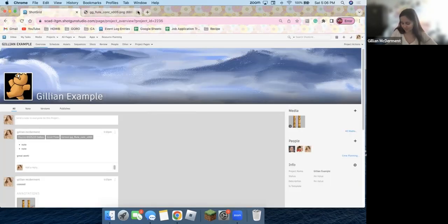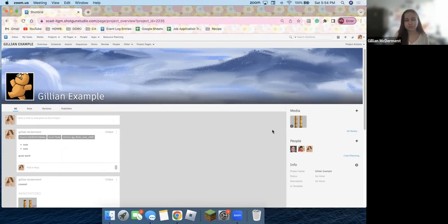It's great. All right, so for this next step, we're going to start creating our sequences and shots. I do advise you to hold off on this until your animatic is final. I know sometimes our shots do change minorly during production, and that is okay. It is all good if we change a few shots rather than changing up an entire shot list of sequences and all that. That's when things get messy. So just hold off on this step until you have your finalized animatic.